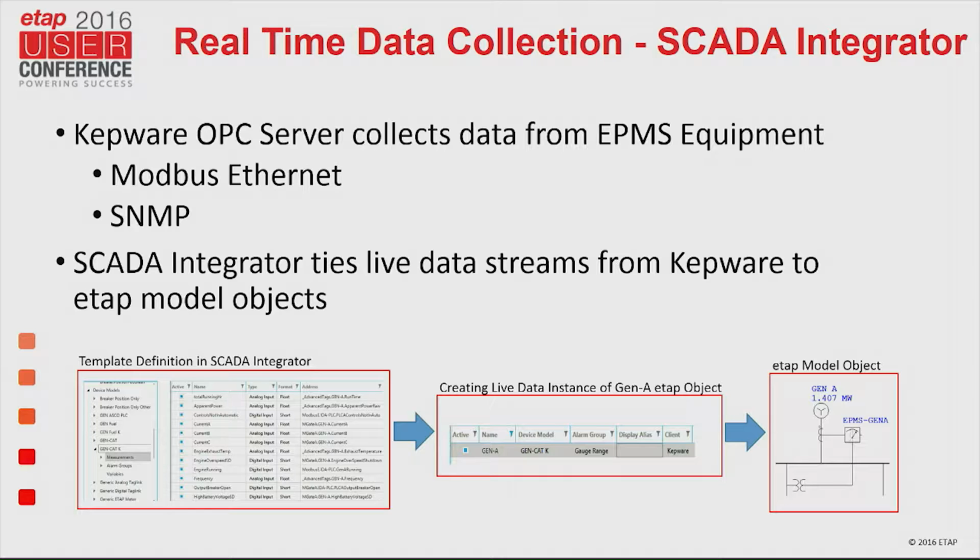The one thing I also didn't bring up is, when you look at how they commission or start up a system, you start at the substation, you get down to the paralleling gear, you get the mechanical gear up and running as quick as possible because you're trying to balance the facility. And then, by the way, you have these racks that you want to get running. Okay, we'll turn those on last. But the first time we're ever to touch anything is after they get power to it.